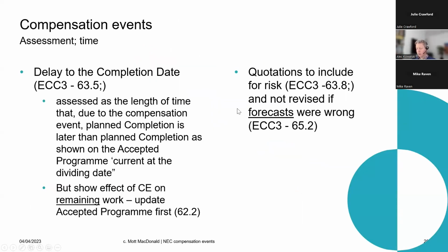Okay, so let's get back to compensation events. A delay to the completion date is assessed as the length of time that, due to the compensation event, planned completion is later than planned completion as shown on the accepted program current at the dividing date.